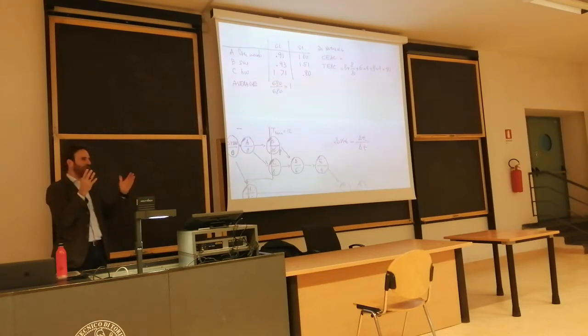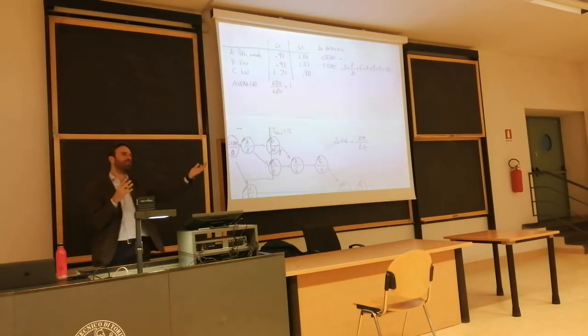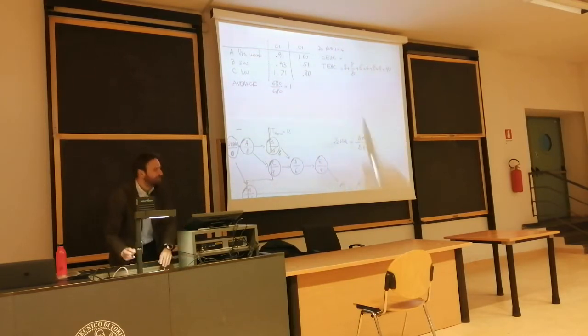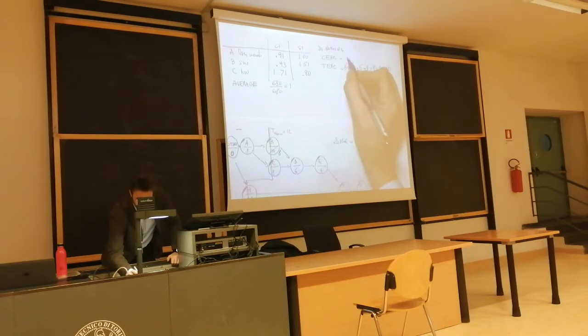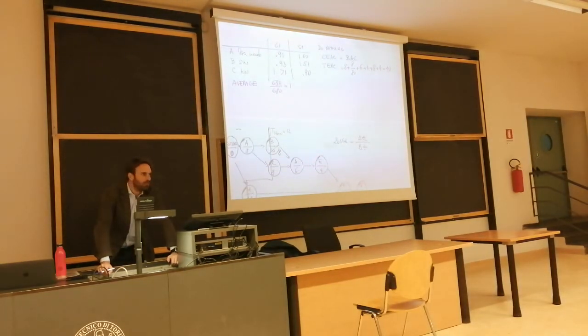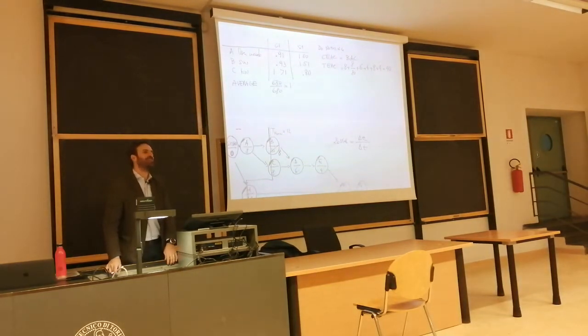So total, so far, we spend more on the system, on the user needs analysis. We spend more on software development, but we saved a huge amount of money in the hardware. So cost index is aligned with expected performance, so we're not going to incur any cost increase. No cost impact. Cost index equal to 1. So it's all about time. Because cost index is 1. So no problem. Yes, please.